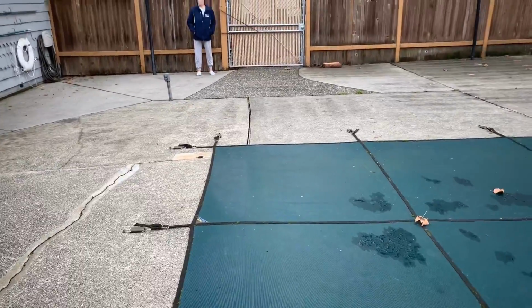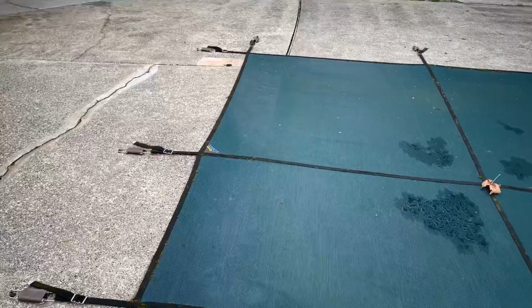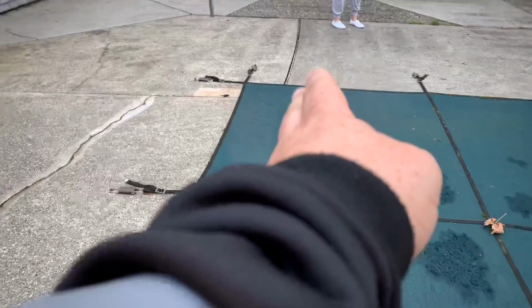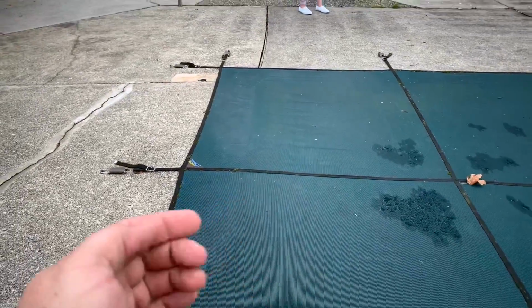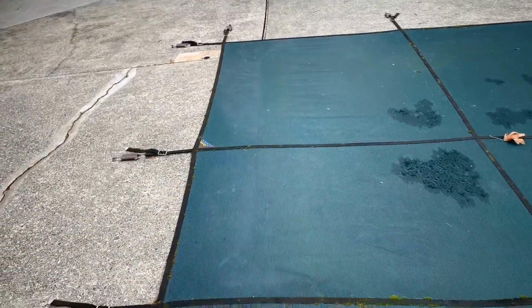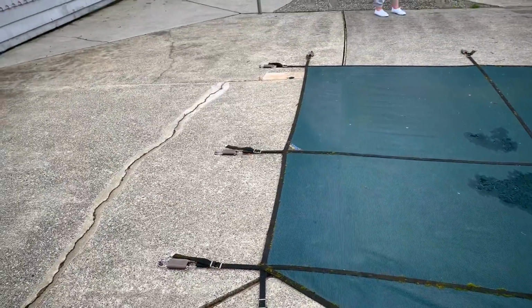pool edge here. Now, one of the challenges is going to be to be able to form something along the side here so that we could pour the concrete up to the edge without it going into the pool. There's currently water in the pool, but just talking with Sue, who's here on the board, they understand that we do our best here to potentially put a board going across the concrete on top, and then we could probably nail a sideboard to it, so that way we can create a boarded wall here, so that way we can pour concrete up to it. Because like I said, there's water in the pool. It doesn't go all the way up to the step, which is a good thing.